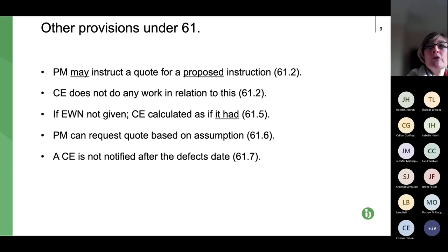the contractor claims extra, and the PM argues a very strict contract point that I've already mentioned, that the NEC doesn't allow the contractor to include assumptions. There's no case law on this, but the response would be that if the PM has accepted the quote under general contract law, an acceptance of a quote has to be accepting all of it, otherwise it's not acceptance. So if the PM accepted all of it but said, I'm not accepting the bit about the assumptions, then that's not an acceptance. If the PM accepts the whole thing, then it is effectively accepting those assumptions under contract law.